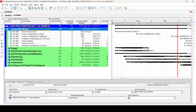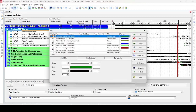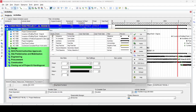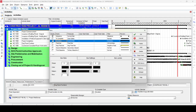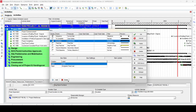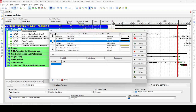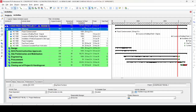When you're doing this for the first time and there's a summary bar, you may get this problem. To avoid it, go to the Bar dialog box, select the Summary bar, go to Bar Labels, and remove everything there. We don't need any labels — we just want to show the bar. Then press Apply, and you can see the bar is clean now.